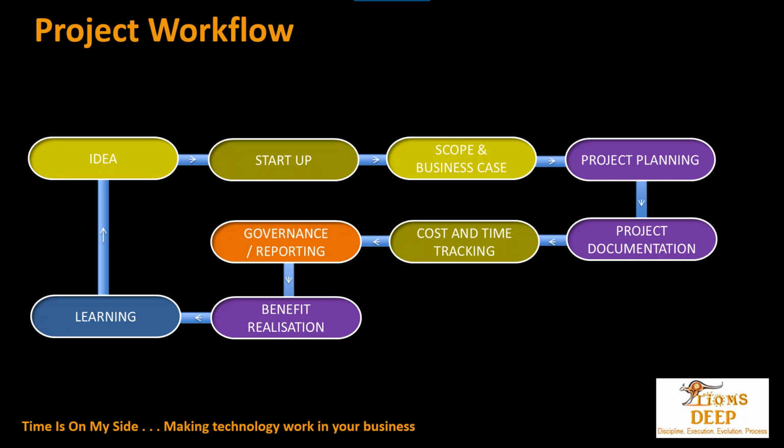Then we have a scope and a business case process. And quite often, if the idea you're working to or the project isn't too large, then a few page scope and business case can be developed in one. If it's a large project, then it's very worthwhile developing a scope, not too large again, 2 or 3 pages, but then a separate, larger, more comprehensive business case.